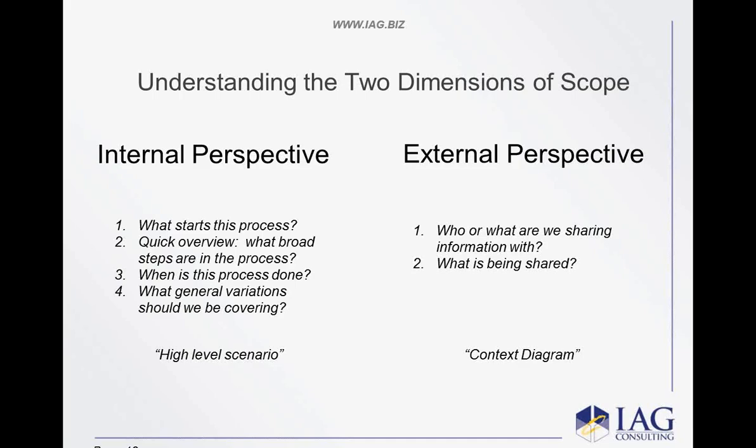What is this process that we're really talking about? What starts it? What stops it? What are the general things that we are doing in here? Because the more questions that you ask them in that area, Andrew, the more you will begin uncovering how big this thing is. Don't take the stakeholders' word, hey, this is just a really small thing. Ask those basic questions, and it will uncover it for you.